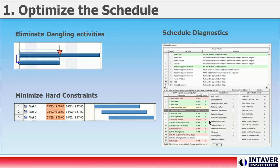Hard constraints — these types of constraints, such as must start on or must finish by, block updates to the schedule. All hard constraints should be replaced by soft constraints, such as start as soon as possible.